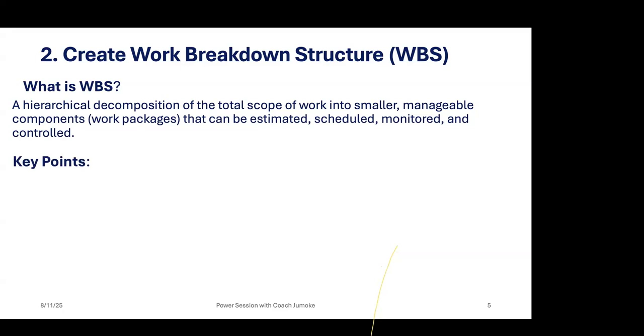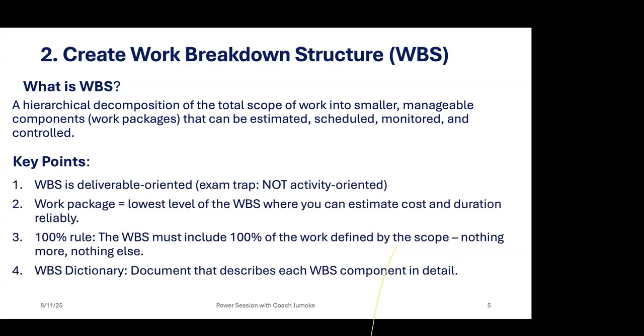So that is what WBS is: a hierarchical decomposition of the total scope of work into smaller, manageable components that can be estimated, scheduled, monitored, and controlled. And the key points you should be looking at when you're talking of WBS are: one, WBS is deliverable oriented. What you should be looking out for in your exam is this trap that they want you to think WBS is activity oriented.